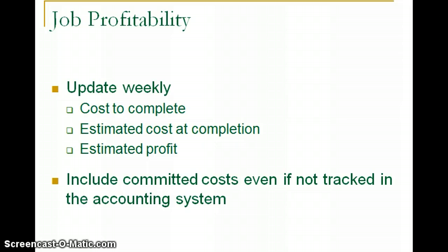Again, the ideal time frame is a weekly basis. Doing it on a daily basis, that's just simply not possible or counterproductive. But also doing it on a monthly basis or even a quarterly basis, certainly that does not help with the company's tracking objectives of keeping track of the finances. So the weekly updates is what we recommend to monitor those expenses for each job.